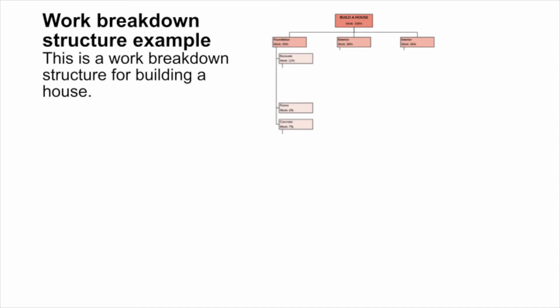To carry on even further, then we would say, okay, let's think about the actual elements that we talked about. Well, in terms of excavation, what are the subcomponents of that? Well, if we look at excavation, we got to be able to dig it. We got to be able to level it. These things take time. They're individual little projects that would be contemplated by a single individual or a group of individuals that would take a chunk of time. If we think about the framing, well, it's pretty straightforward to be able to put up the framing. But if we think about concrete, we got to be able to pour it, we got to cure it. These sorts of things need to be brought into the mix.